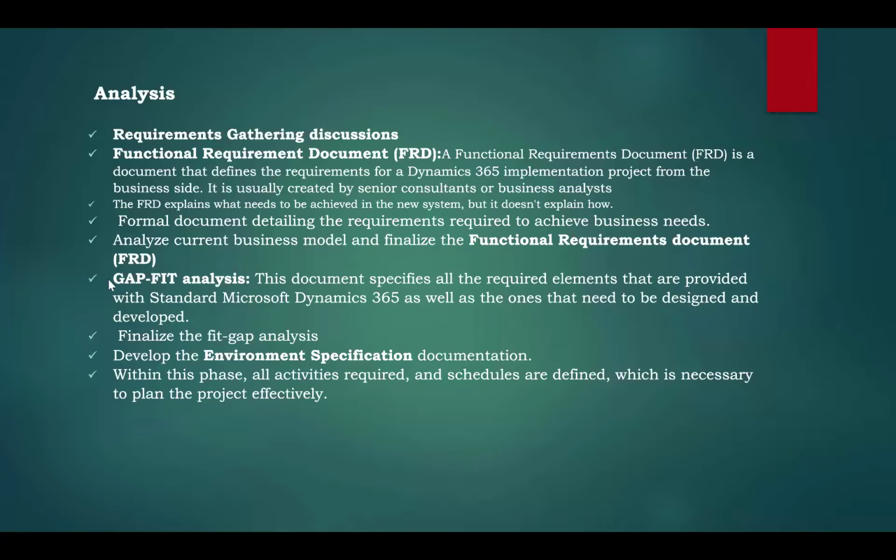For that reason, we will convert all these FRDs into gap fit, and we'll classify them into fit, gap, analysis required, and technical, sorry, whether customization is required or not. All those things will be classified based on the gap fit analysis. These are the most important, FRD and gap fit, because based on this only you're going to drive the entire project. Without clarity or clear analysis on this gap fit and functional requirement, how do you drive? You cannot drive the entire